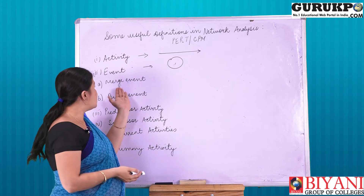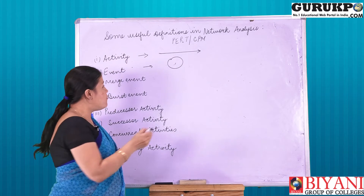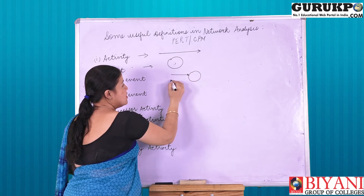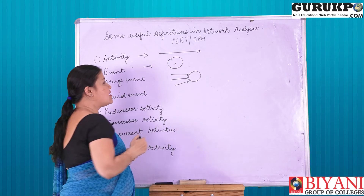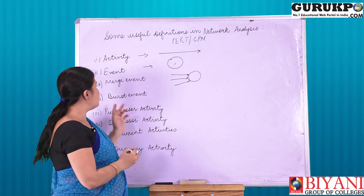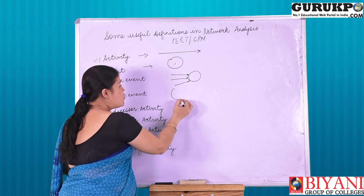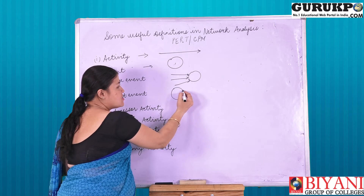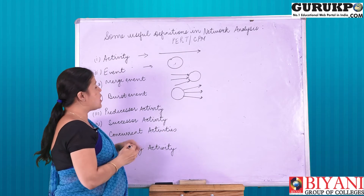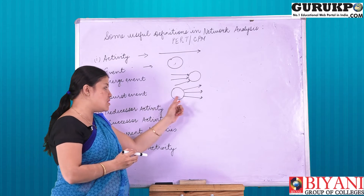Moving on to the next is merge event. As indicated by the name, when two or more activities combine into a single activity, that event is known as a merge event. Next is burst event. A burst event is when from one activity, two or more activities are dispersed — that particular event is known as a burst event.